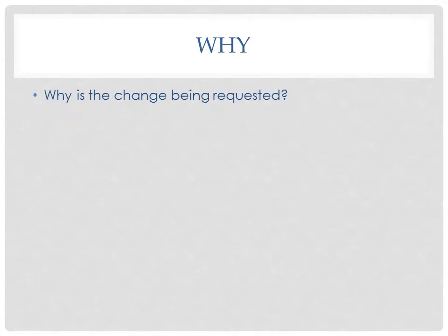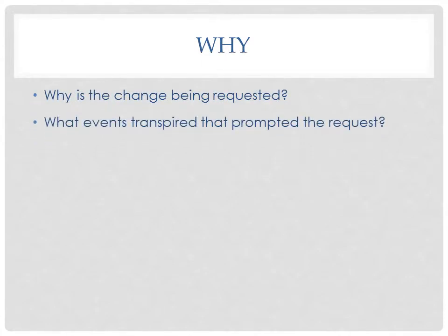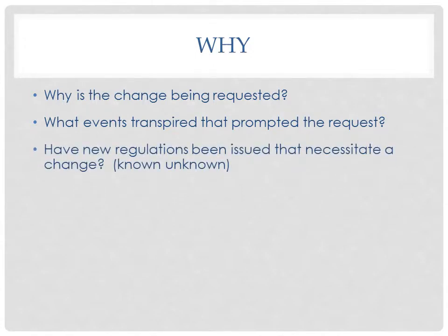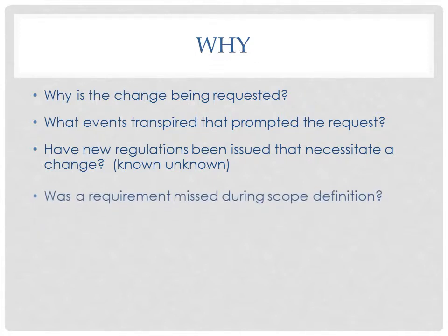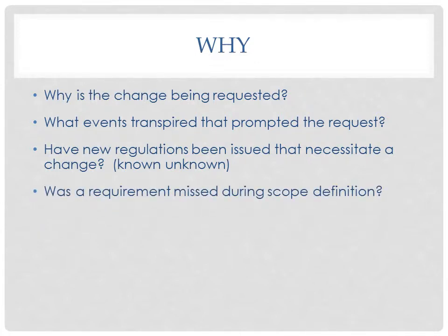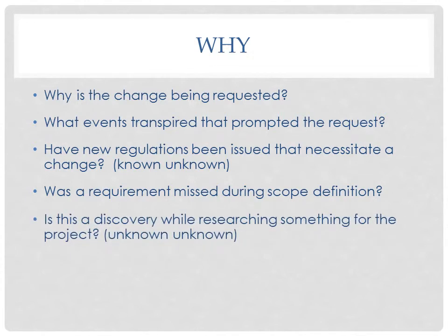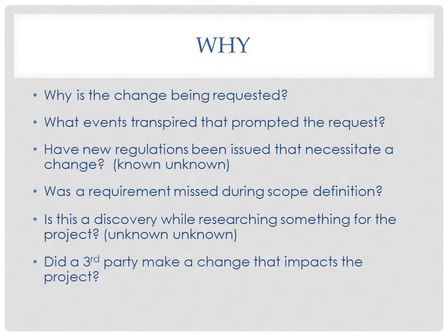In documenting the details of why the change is now being requested, you can include such things as any events that have transpired since requirements definition. Maybe new industry regulations have just been finalized. Perhaps a requirement was missed during scope definition, or just that new information is now available that wasn't previously. It could even be related to a third party making a change that now necessitates a change by your team.